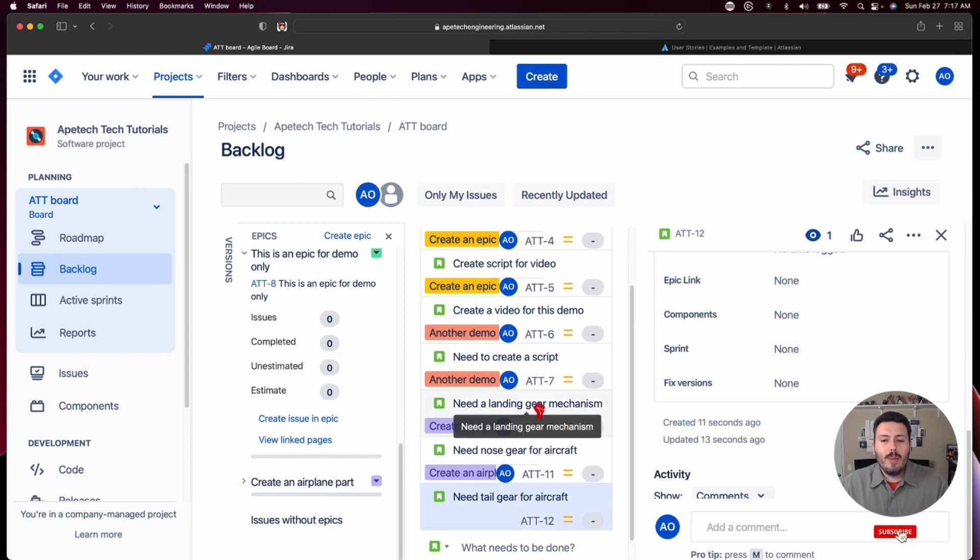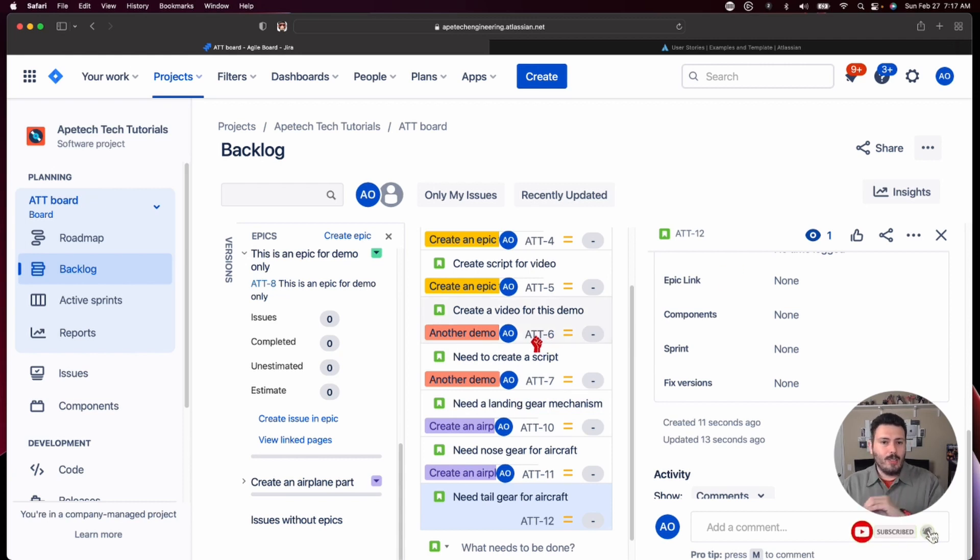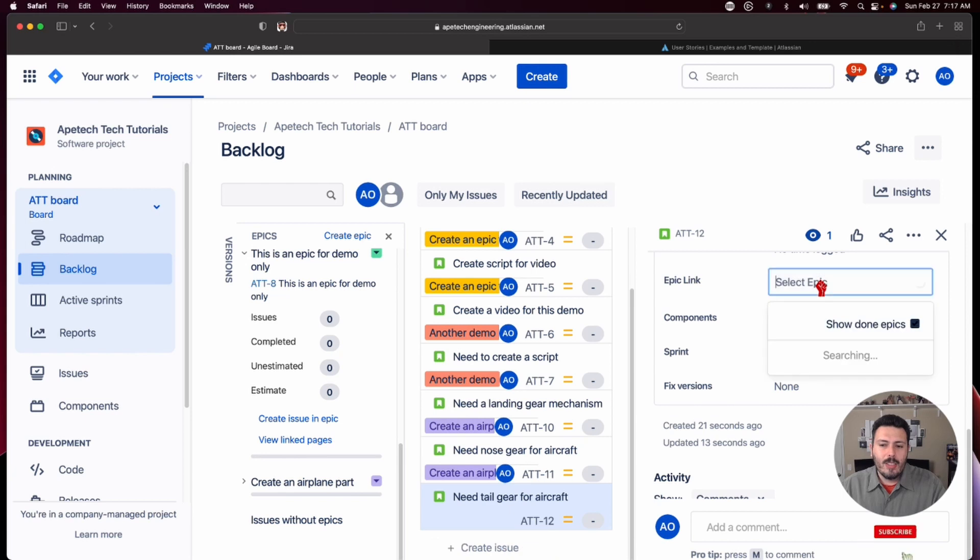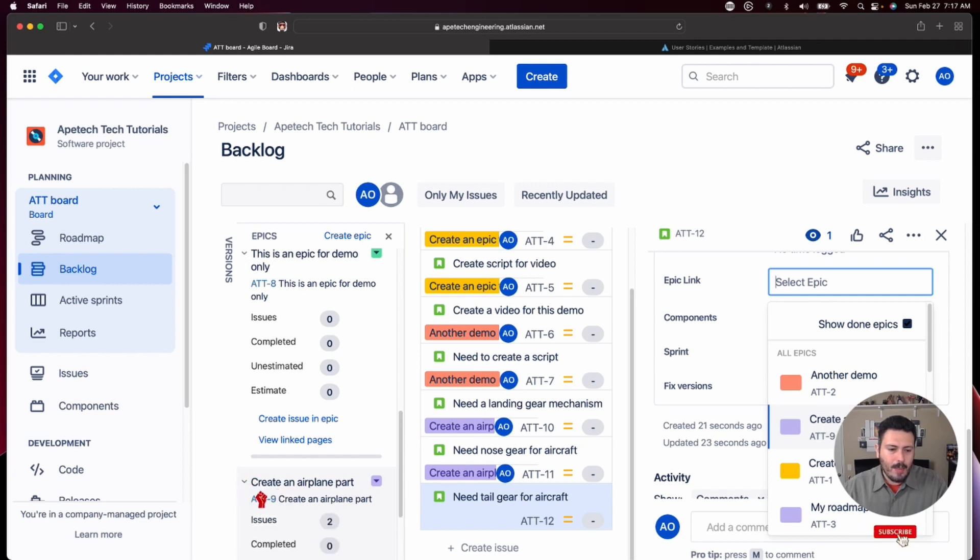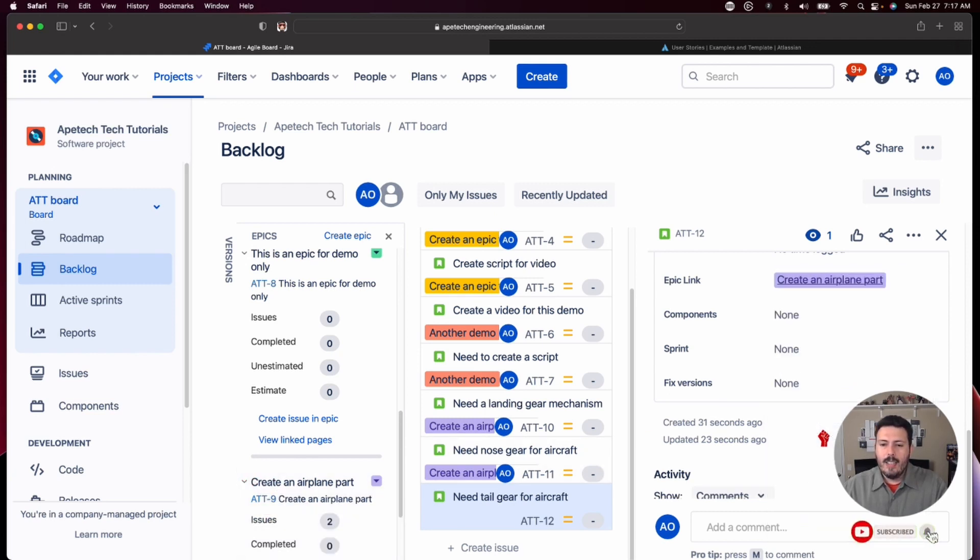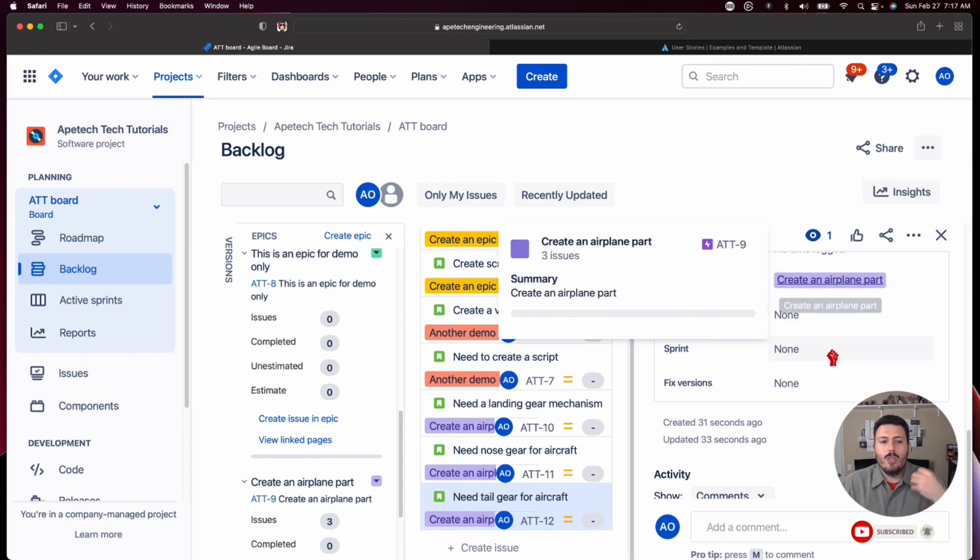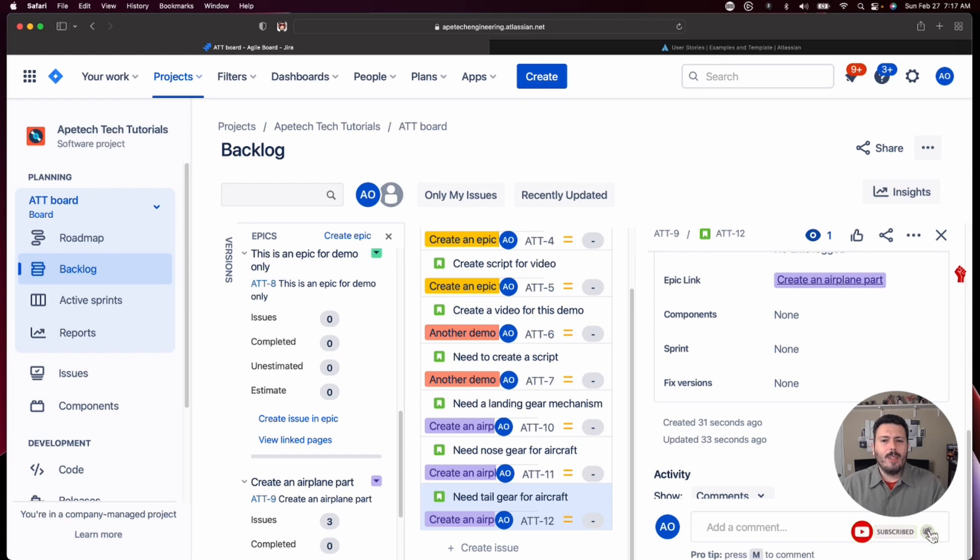this brings us to way number three of creating or associating your story to the epic. And you can actually come in here into epic link and you can just click into it and go and find your epic. So this is AT-9, which is the same epic here. So you just click on it and that will automatically link your epic to your story. So that's way number three if you're keeping track at home.